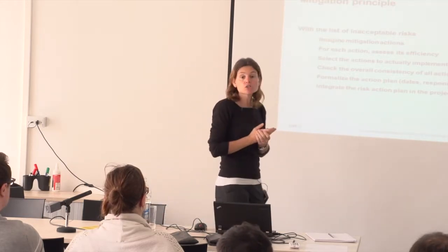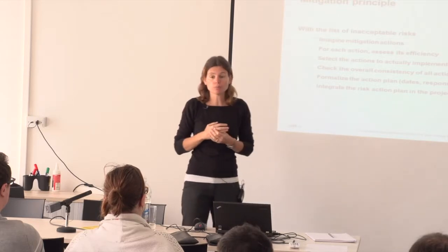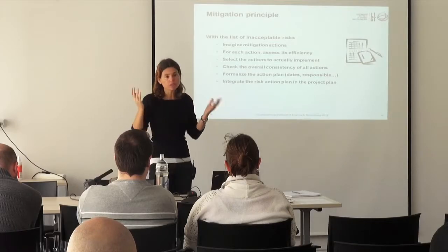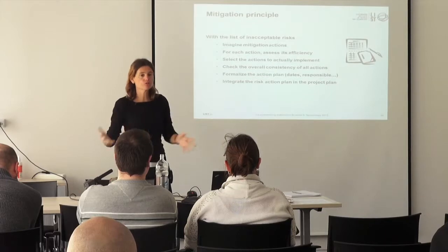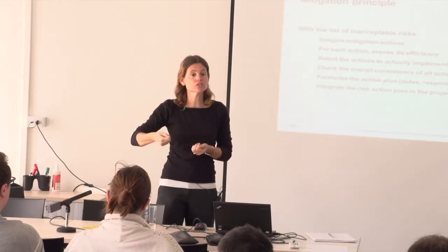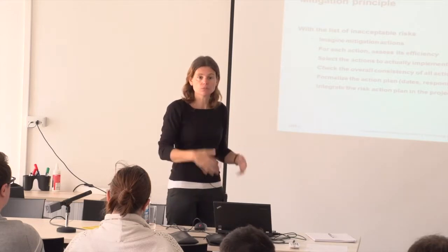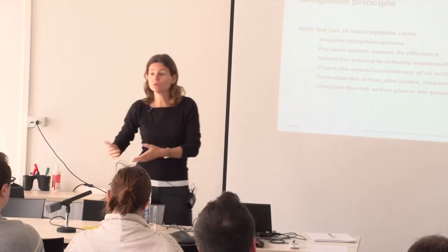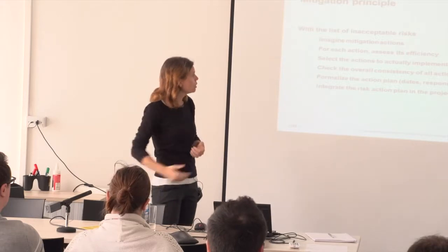You select the actions that you actually want to implement. So maybe of all the good ideas you had, you select just a few of them. Because at the end, if you sum up all the cost of all the actions, you will spend more time doing risk management than actually working on the project.